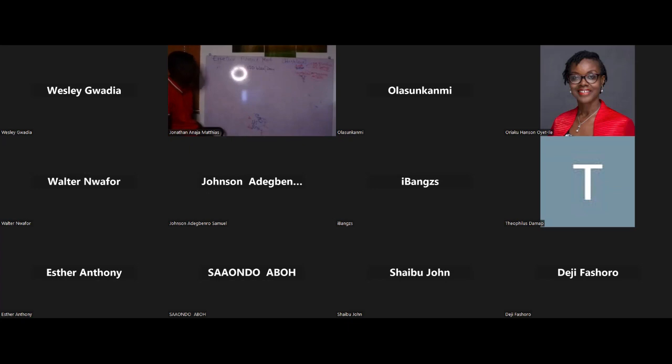Yes, you are. Good. Now, if your client, this architect Riaku's question, I will also answer here. If the client now says he does not have 5 days, what will you now tell the client? This is now very straightforward. You now tell the client, okay, let's use 2 masons that can do this, right? So if you are using 2 masons, it means we can do this in what? 2.5 days. Am I correct, Mr. Wesley? Yes, you are. Yes, sir.